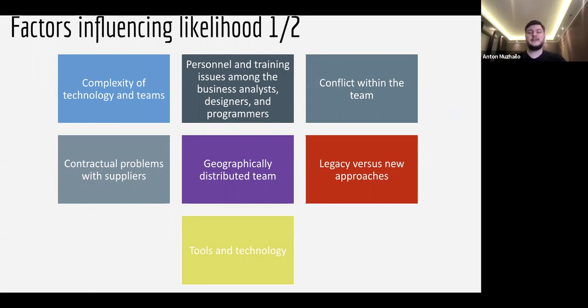So these factors will help you to establish the general risk level, to understand what the test strategy for the entire product will be at the beginning. So this is the complex technology. It can be a new technology, right, which was not even tested properly. It can be like a new version of an Angular framework, right? So there is the risk that the developers have not learned the new version of a framework enough, so they don't quite know how to use it effectively right now. So this can increase the risk.